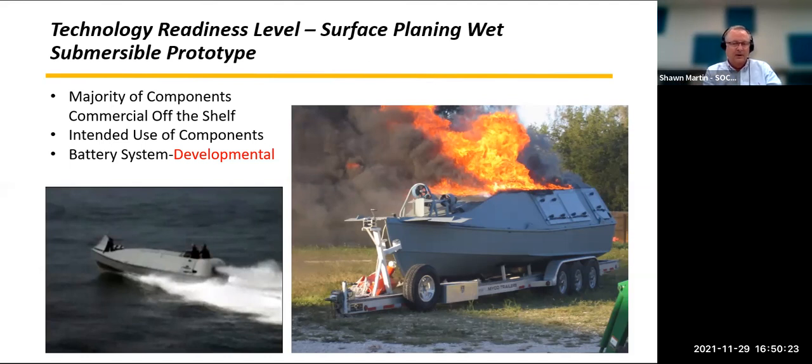They pulled it out of the barn, and that was actually a photo that was in the newspaper in Marathon. It burned the whole top skin and burned right through the aluminum hull. So this was a case where we, as a government and design team, were managing the risk of having this low-TRL critical subsystem developed in parallel. The vendor on their own decided to put it in without the authority of the government. And this is what happened. This is an example of what can happen every time. It just depends on the criticality of the subsystem.